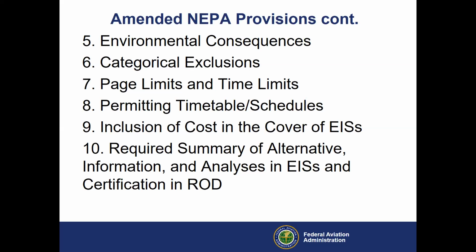Number 9, the CEQ regulations pertaining to information that must be included on the cover of an EIS now include the following. For environmental impact statements, the estimated total cost to prepare both the draft and final environmental impact statement, including the cost of agency full-time equivalent (FTE) personnel hours, contractor costs, and other direct costs. If practicable, and noted where not practicable, agencies shall include costs incurred by cooperating and participating agencies and applicants and contractors. So that's quite the requirement.